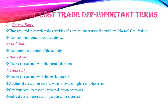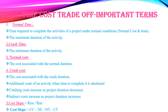Indirect cost increases as the project duration increases. Cost slope is the ratio of rise to run, calculated as: Cost Slope = (Crash Cost − Normal Cost) / (Normal Time − Crash Time).